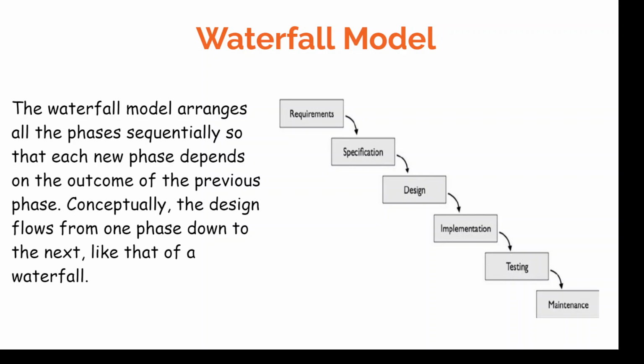So this is usually suitable for a very small project. It's not a suitable method for a large project for a number of reasons. First reason is that there are no early deliverables. Meaning not till the end of the project do the customer and end users get to see an MVP or what the software looks like, and that makes it very rigid and inflexible.